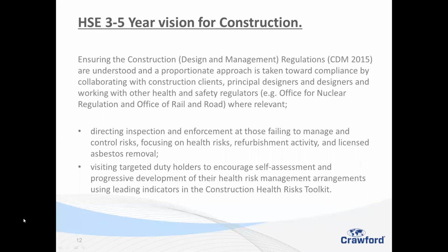Sometimes how we dealt with it was very handy. It was on an A road and there was a lay-by situated just at the road. We spoke to the highways and the council. They allowed us to put a welfare unit there, put a portaloo closer to the actual work site. There were organised times for breaks when they were taken to the welfare unit. We've also, with the Carlisle floods, been able to commission an empty property, which was 3 or 4 doors down, and in one case a whole street down from the work site, but very accessible and within a couple of minutes walk. Again, it's all about organisation and also documenting why you're doing it.